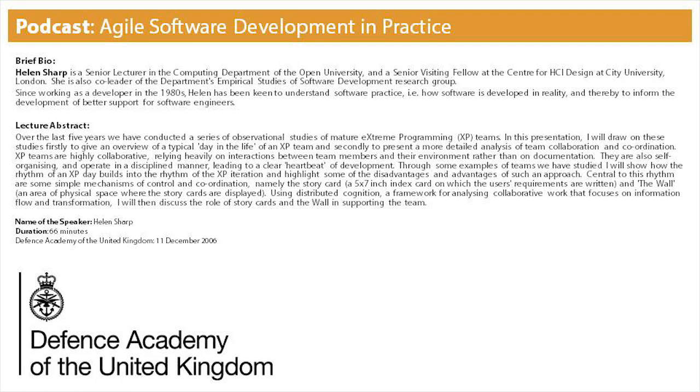And that whole notion of the physical artifacts, this middle one here, is something I've been working on at the moment. The large organisation I'm with at the moment use the wall in a different way. Because they have distributed teams, they have an online version of the wall as well as the physical wall, which of course introduces the problems of updating and making sure that they're in sync. But it's their way of coping with the fact that they are distributed. They can't do much about that.